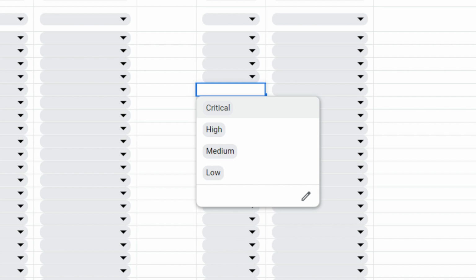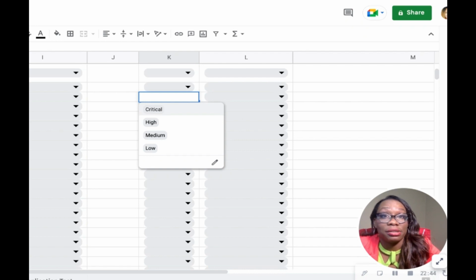So if something is critical, it means it's urgent. It has to be fixed right now. So these are the ones that you should definitely be taking to your Scrum if you're doing Agile to say, hey, we need to focus on this right now. And plus, if you're doing a regression sprint where you're supposed to be fixing bugs anyway, these are the bugs you want to focus your attention on first. So this is what the BA should be taking back to the team and discussing and trying to find solutions for.